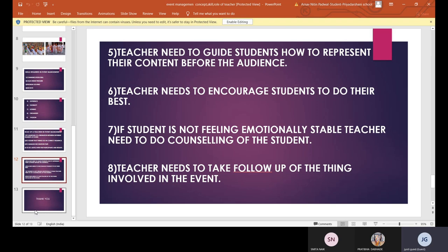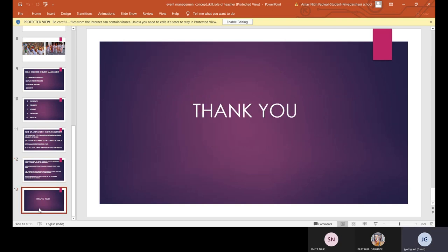The eighth point is that the teacher needs to take follow-up of all the things involved in the event. Sometimes the event is organized very nicely but at the last moment something goes missing — some service is not available. So one or two hours before the event starts, the teacher should take follow-up to check which services are still in place so that the event goes smoothly. We have now discussed the concept, the skills required, and the role of a teacher in event management. Thank you.